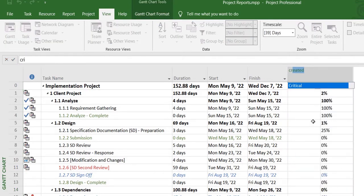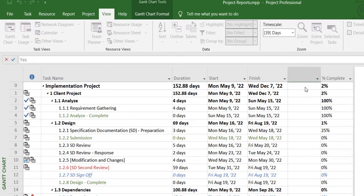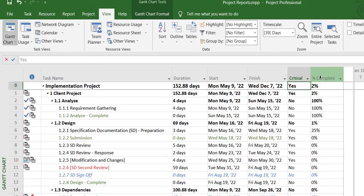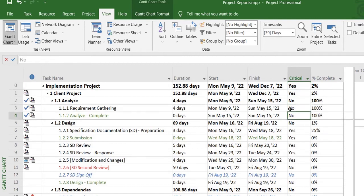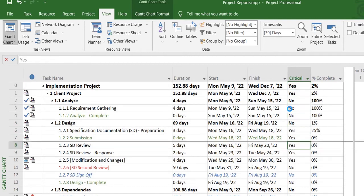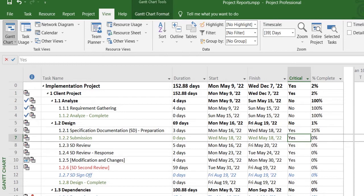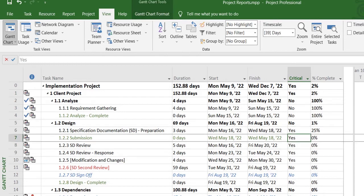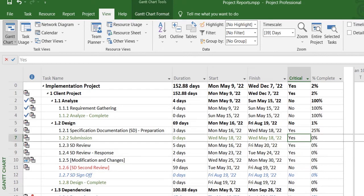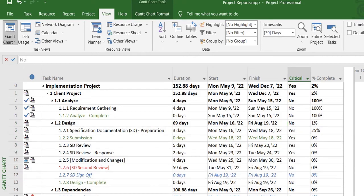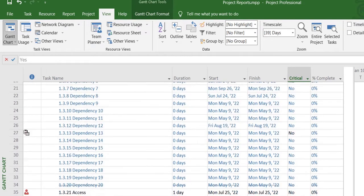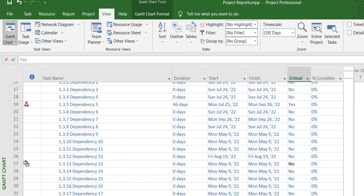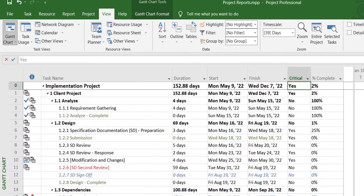Type 'Critical,' and over here you will see a Yes and No column which will mark or show you the tasks that are marked as critical. So the ones that are marked as critical tasks are shown as Yes, and the rest are shown with No. So these are a few things that you can use in seeing and identifying critical tasks in your project.